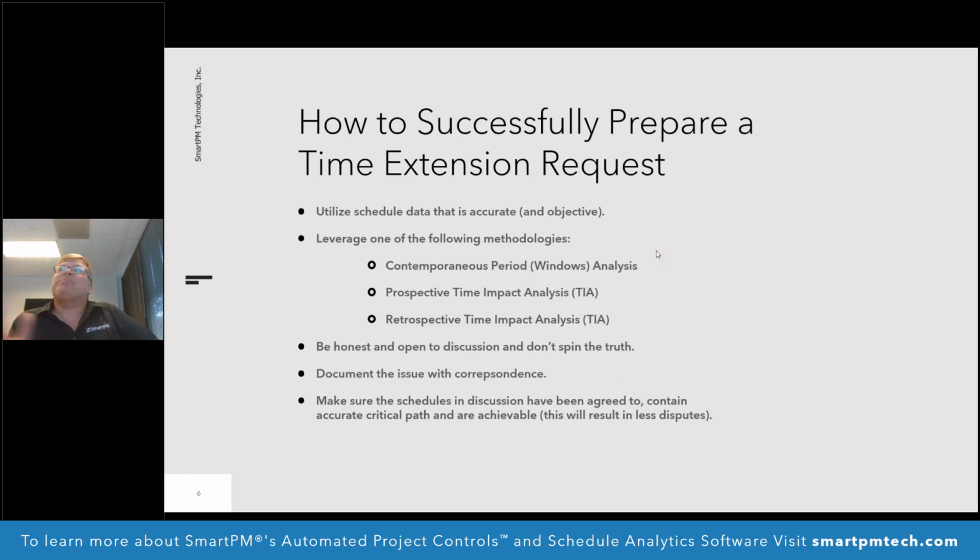There's this as-planned, as-built analysis, which basically says, you had a plan at the beginning and that's the only plan that matters. But in reality, at each update period, you make changes. People make changes. Sometimes those changes are a little too aggressive, and we're going to talk about that. But in reality, I like to think that changes are necessary because you're learning and you're resequencing. And I like to trust that, and based on all the contractors I've met, they use the scheduling process to get the job done and get it done right.